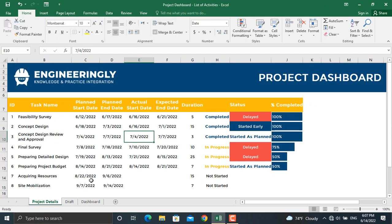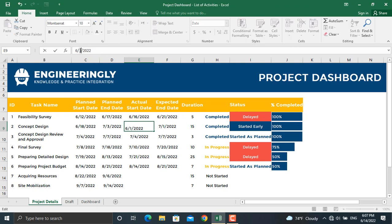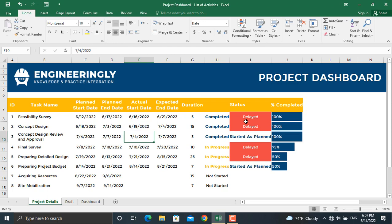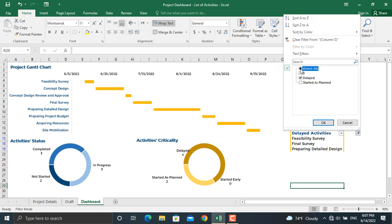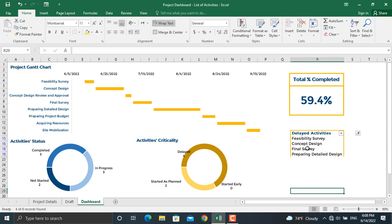For example, if I go to project details and change the status of this activity to delayed — by making the actual date later than the plan date, so the actual start is 19th of June 2022 — as you can see the activity status becomes delayed. If I come to the dashboard, remove this filter, and apply the delayed filter, the activity will be automatically added here, and all the charts will be updated.